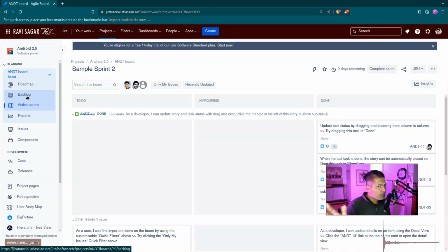Now, when you do a bulk move of those issues, Jira will take care of the old links. So whenever someone clicks on the old link, because they may have the old link to that issue, Jira will redirect them to the new issue in the new project. But I would recommend that you spend some time looking at this scenario, and try to identify things that will not work, like filters and dashboards might need some reconfiguration.